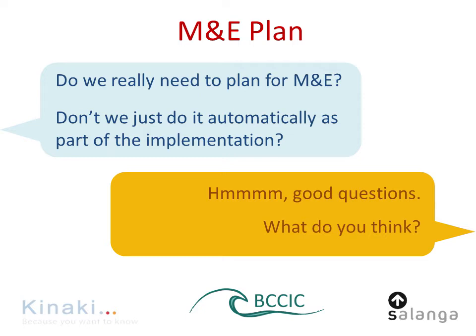But the monitoring plan should tell us more about who is responsible for it, what the frequency will be, at which event, how we are going to monitor each activity exactly, and also looking at each higher level, that means intermediate or immediate outcomes.